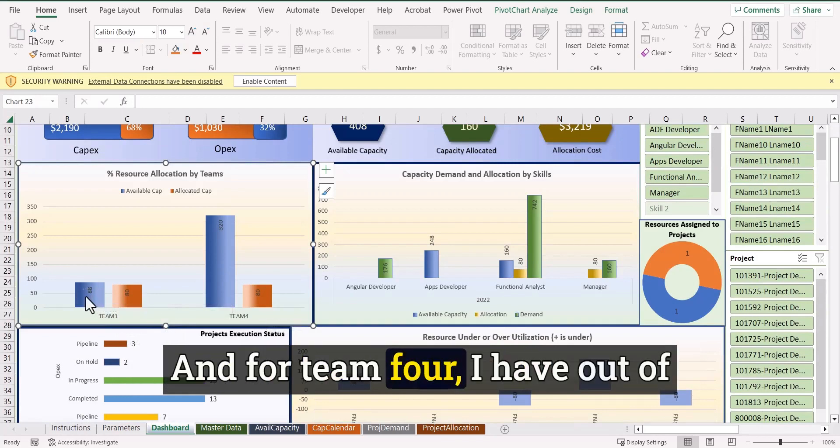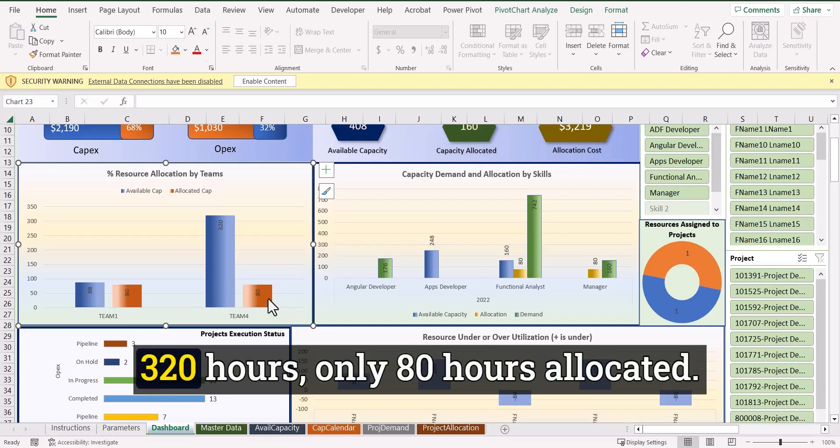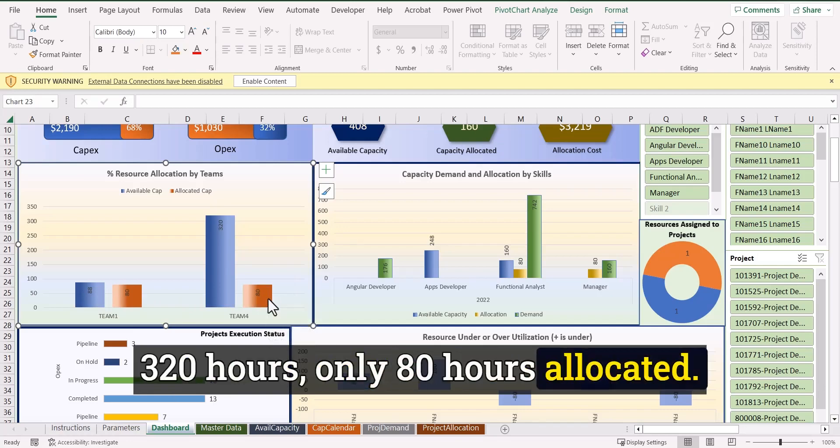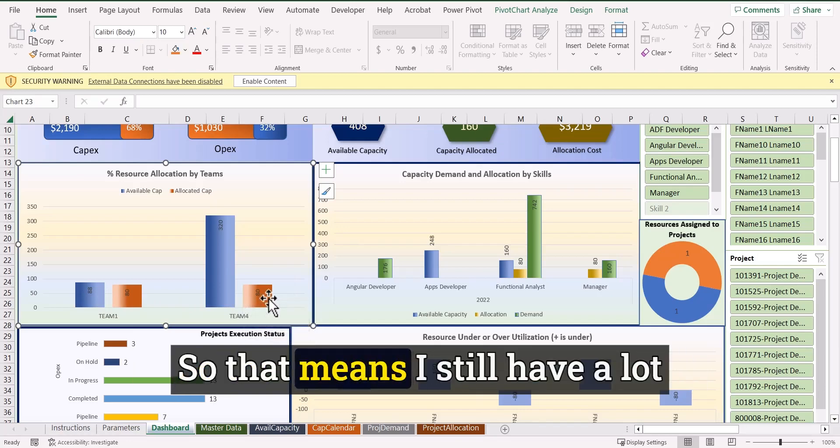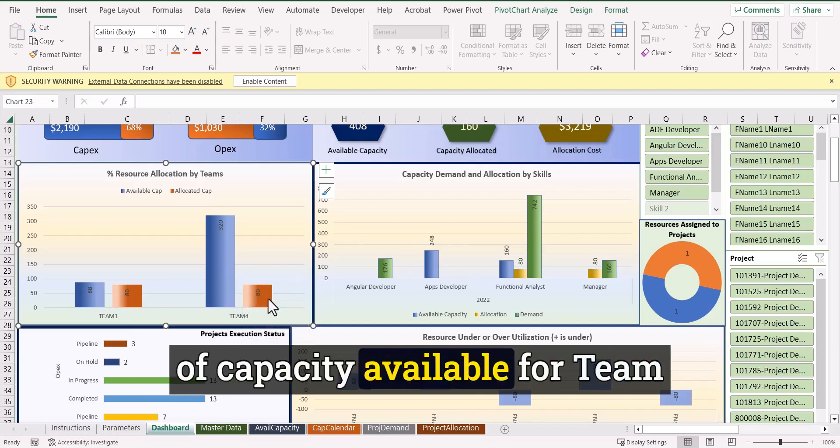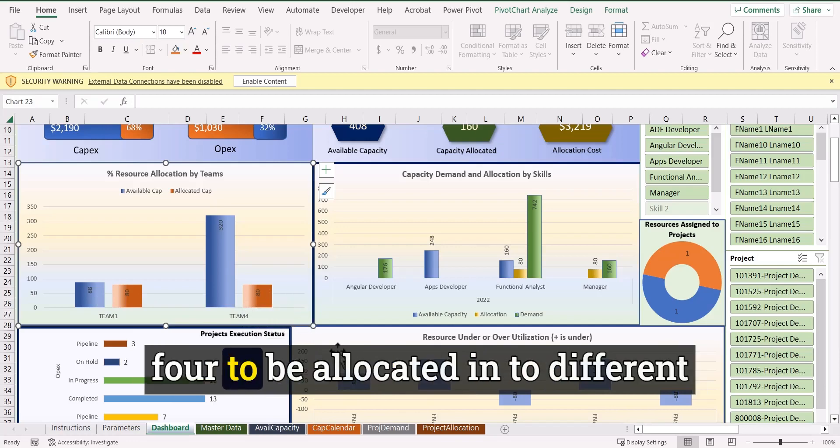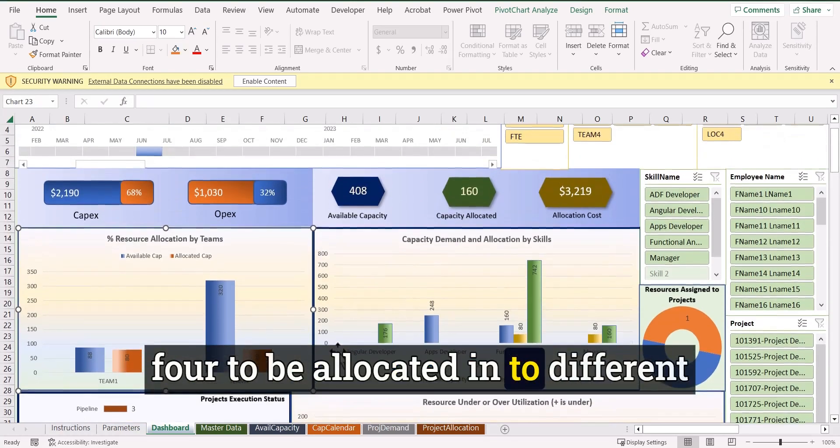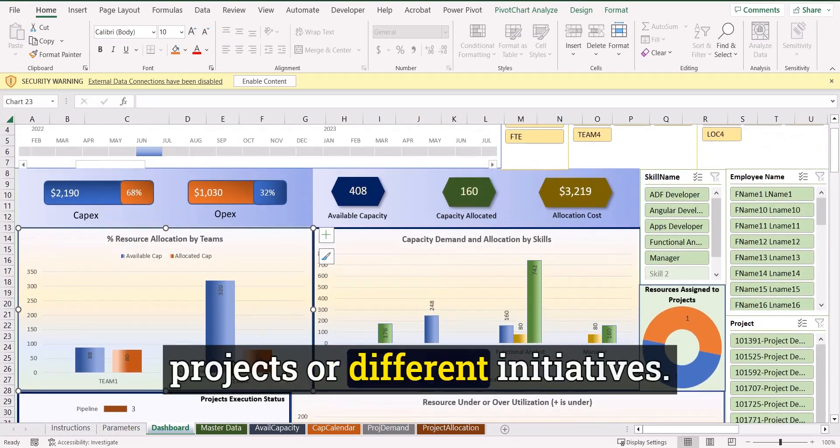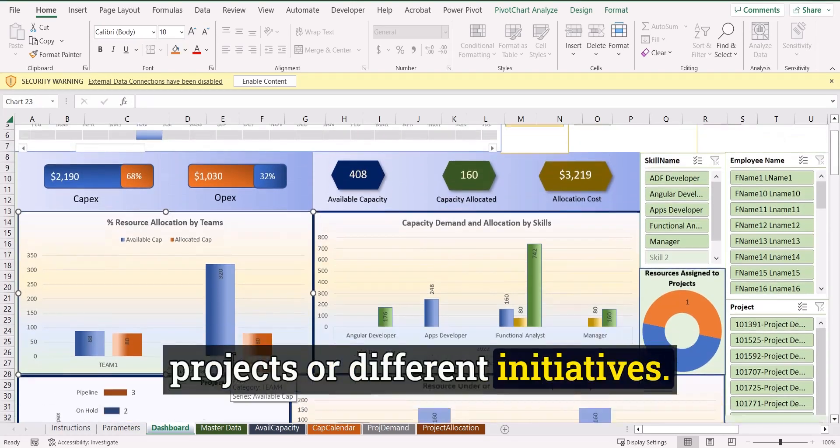And for team four, I have out of 320 hours, only 30 hours allocated. So that means I still have a lot of capacity available for team four to be allocated into different projects or different initiatives.